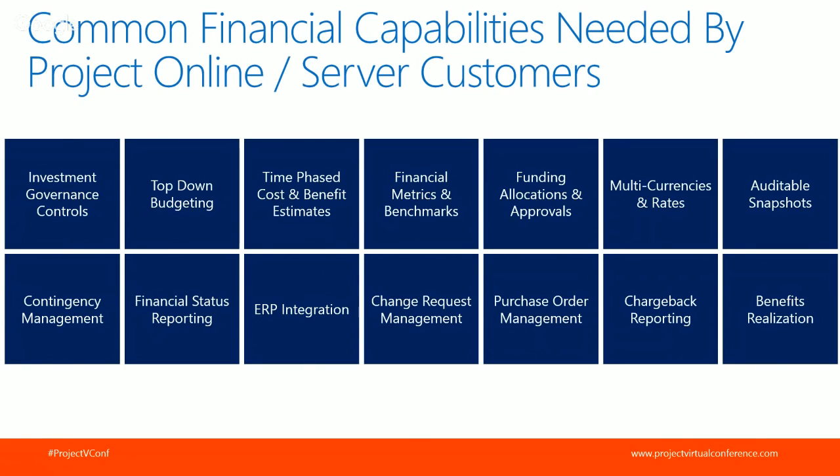Get a lot of organizations looking to reconcile purchase orders with projects and also look at things like committed costs. So, maybe the total committed costs are based on the total approved purchase orders. So if you're looking to cancel a project, it's not just based on the actuals to date.